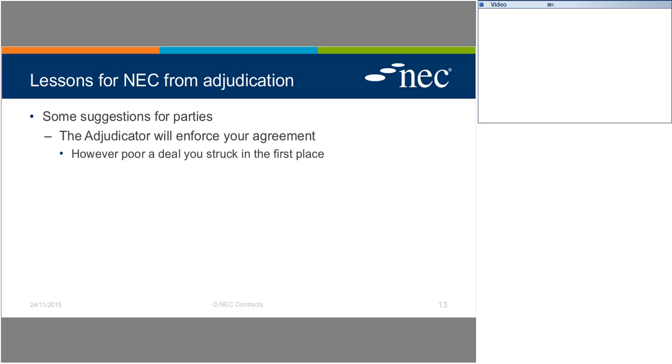Yes. The contract gives both parties, it's not just about the contractor's recovery there, an entitlement for stated events. And with compensation events, I forget the clause number for the minute, but there is a statement that those provisions are the sole remedy for compensation events. Yes. So whether that leaves the contractor feeling he's under-recovering, or the employer believes he's overpaying, the contract takes precedence there. Yes, recovering under the contract he agreed. Yeah, absolutely agree, Patrick.